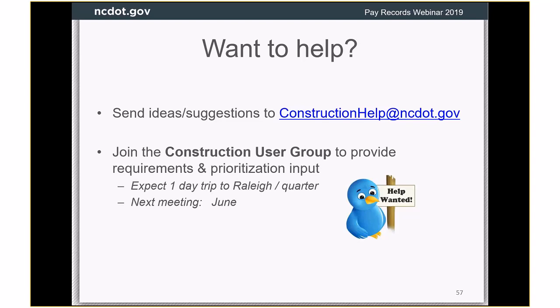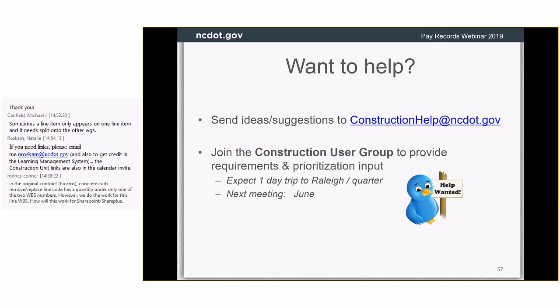But the mechanism used to make that split would be an other change to the contract. And what we were told by the people from the user group who asked us for this spread functionality is that anything that was changed after the original contract, we don't want to reflect in that proportional spread. So say this was called a merge.